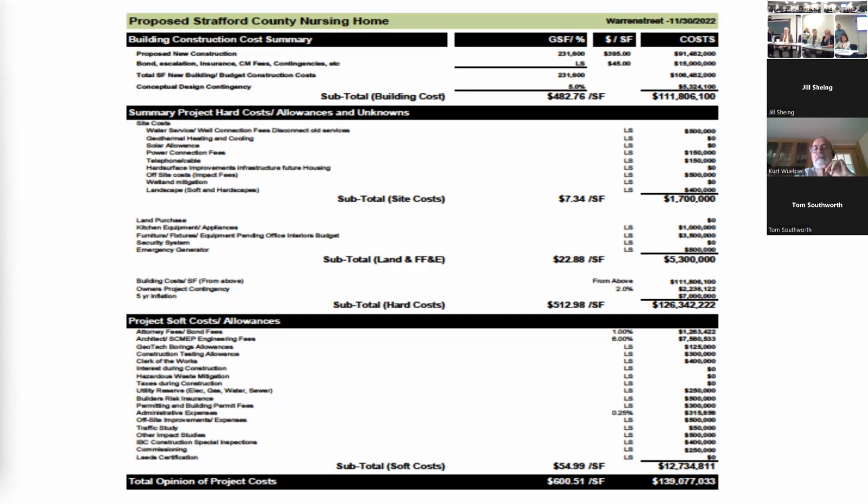When we did Sullivan County, we completed the design 3 years ago. The delegation changed, and they second guessed every decision that was made with the prior group. They created a committee, they went back and reviewed everything. It took them 16 months. And ultimately they decided, you know what? The plan on the table is the best choice. They talked about moving the home to Claremont, building a new home in the field across the street, mothballing the old one. They talked through everything.